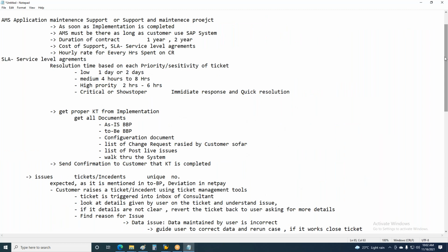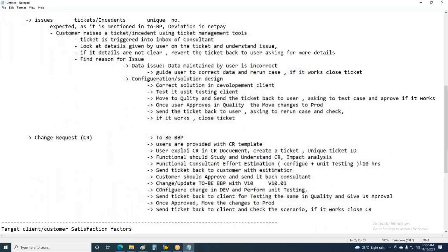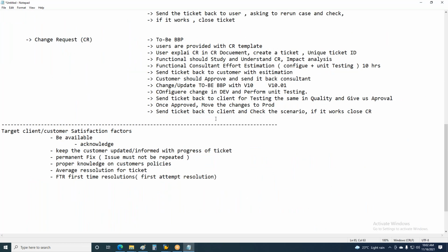Sir, one question, sir. Yeah. Sir, in a project, how many consultants will be there, sir? Functional consultants? We cannot measure it. See, it depends on the complexity and the scope of the module. For example, if the payroll is complex for the customer, one resource will be there. Sometimes one payroll implementation is handled by one senior and one junior. Okay, sometimes if the module scope is small and the project cost is less, then one consultant will be handling multiple modules like OM, PA, time, payroll, all implemented by one consultant.